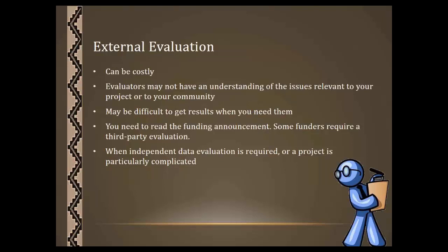Let's say you're creating a training and a curriculum that you plan to make available to tribes and organizations throughout the country. Or you're trying to prove that you have expertise in a particular subject area. Then you're probably going to need an external evaluation in order to receive an objective analysis of the effectiveness of your training or your program.